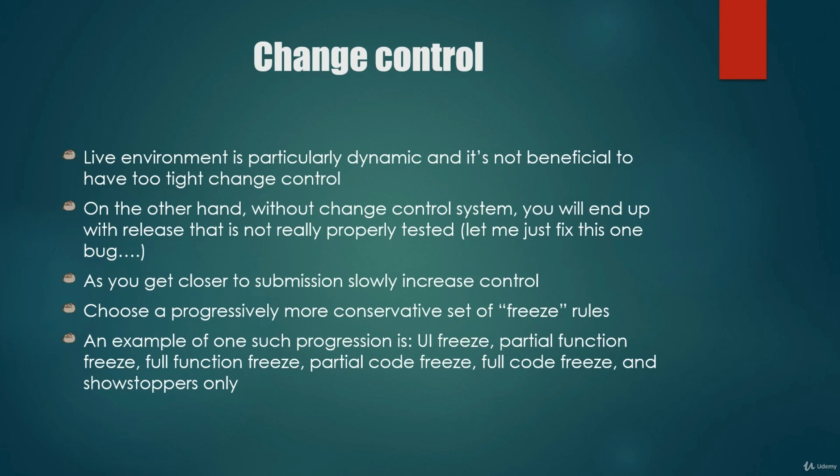But just make sure to understand that if you have an option to do some kind of code freeze, do it, because you want to make sure that the build that's going live passed at least some kind of basic acceptance testing, and that everything that's new in this build has been tested.